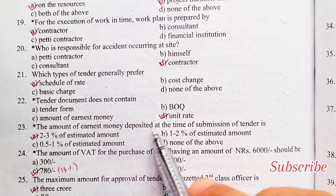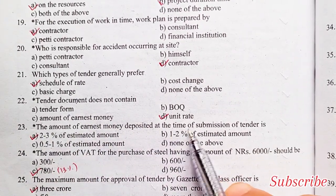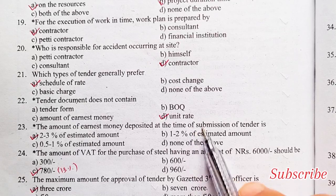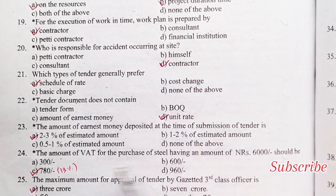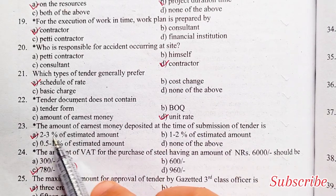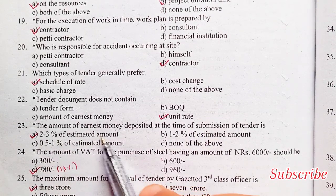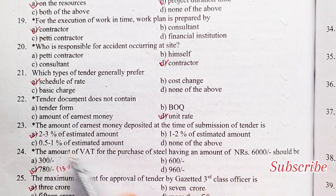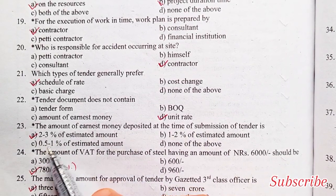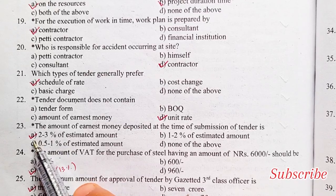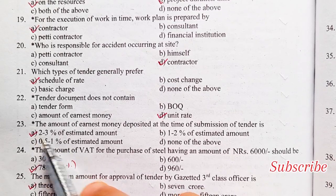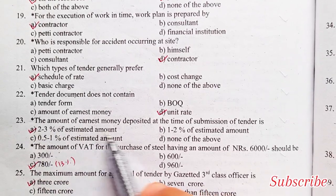The amount of earnest money deposited at the time of submission of tender is: 2% to 3% of estimated amount, 1% to 2%, or 0.5% to 1%. Option A is the right answer — 2% to 3% of estimated amount.